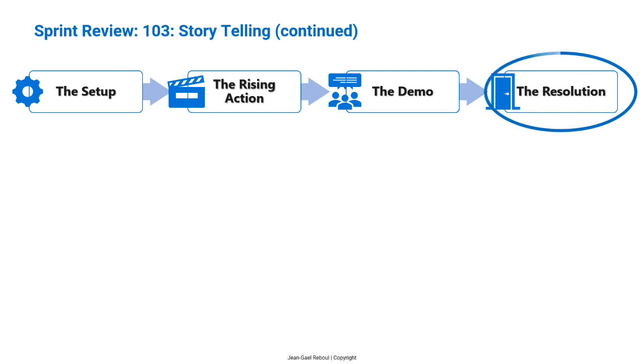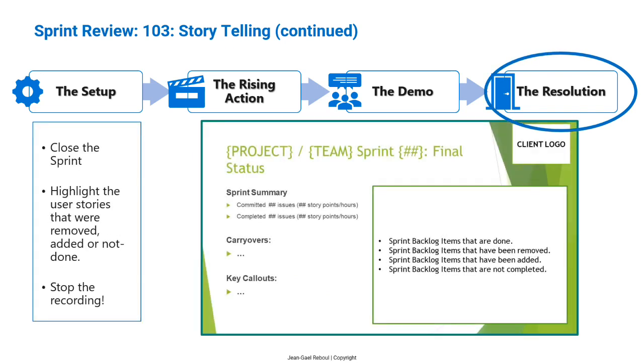The end, the resolution. First things first, as the team went through the demos, you should have captured the feedback from all the invited stakeholders. Since the meeting is recorded, it should be easy for you to follow up on what the next steps are, on what was discussed. And then, before effectively closing the sprint, you want to obtain the green light from the product owner to close it so that there's some type of formal approval.